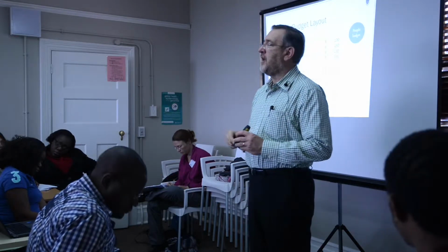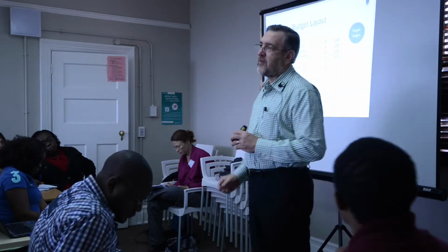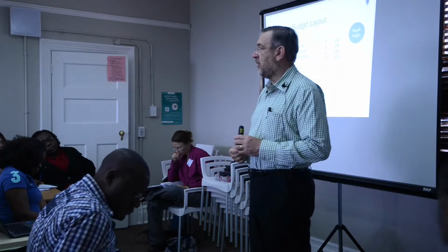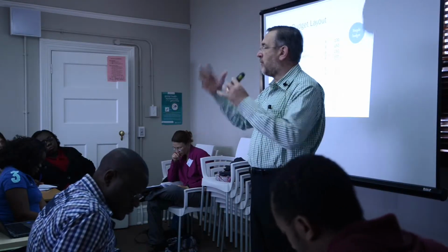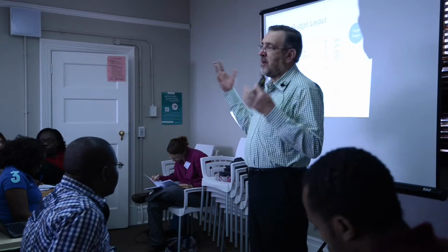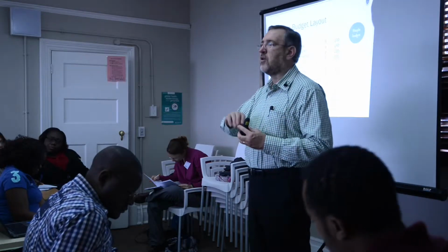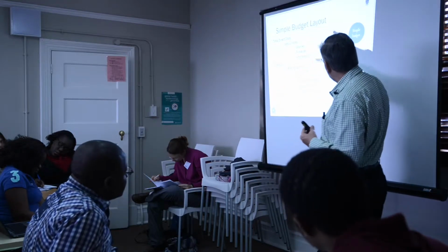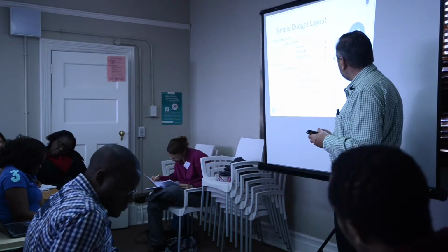But the electricity and the garden service and the security at the gate over there, are they only applied to this workshop? No, they will be here all the time. This room, this building is using electricity and the security and the library. It's there all the time. So those are called indirect costs. You can't relate them directly to a particular project. Okay, we'll come more to that in a moment. So for now, we're just dealing with the direct costs.